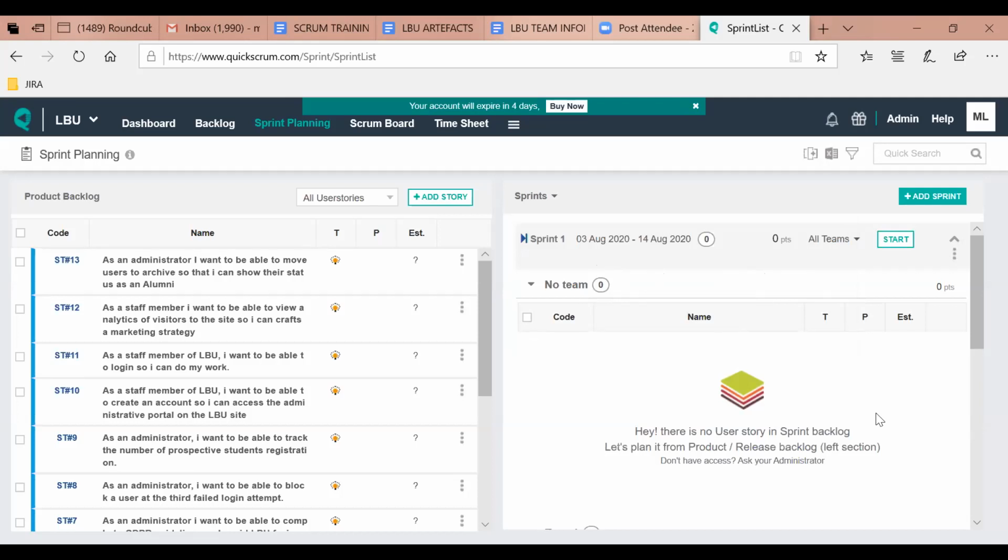But normally, when you have a backlog, all the things that we have on the Google Docs would be in this tool. But we all know that everything is not here yet. Do you see what I mean? So I don't want you to think that every time you have to empty your backlog into your sprint backlog. No. Okay? Exactly. So now we are not going to push anything into the sprint yet because we are not done yet at all.